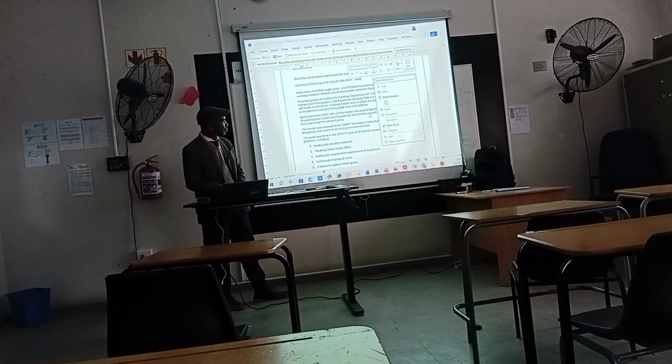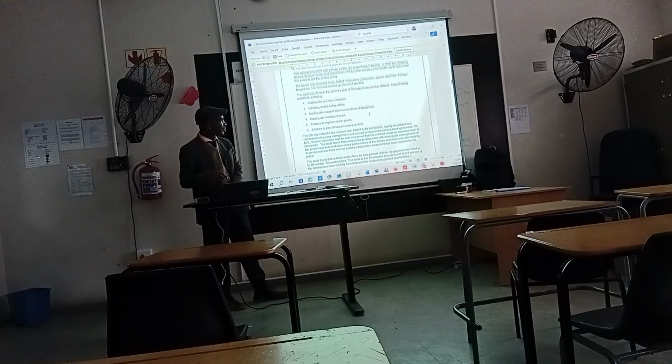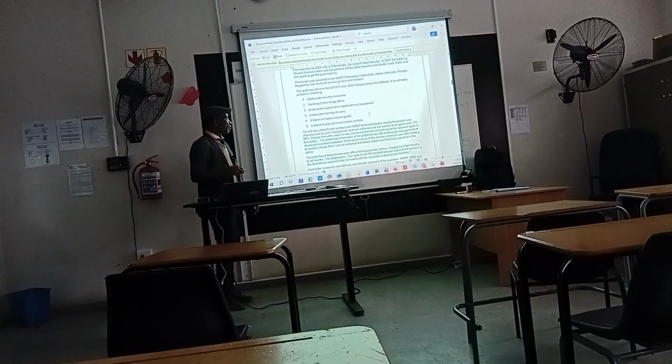So these are some of the problems that the audit report has concluded. Then you have a failure to pay service providers on time. These are problems. The DA has called for the contract with SNMT to be terminated, saying the project was characterized by poor management and non-adherence to the service level agreement.